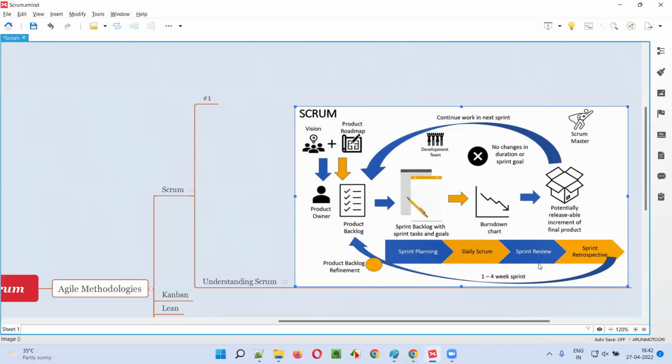And at the end of the sprint, again, those stories which are completed will be demonstrated to the product owner in the sprint review meeting. And the product owner needs to accept. If accepted, the sprint will end. Okay, so this is what will repeat, guys. Iteration 1, iteration 2, iteration 3, sprint 1, sprint 2, sprint 3, the work will go on. Okay, it's a continuous process.